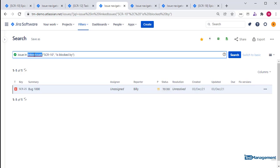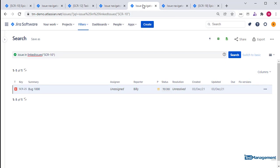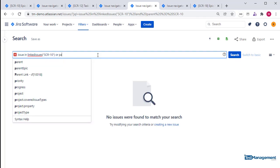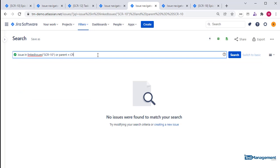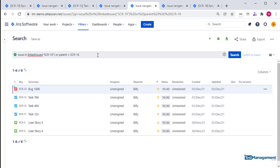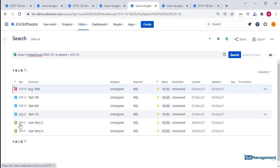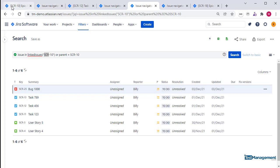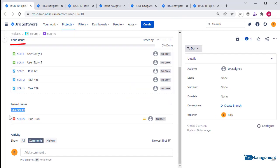If you want to find all related issues, that is both child issues and linked issues, then you can combine both of these JQL statements with 'linked issues OR parent equals SCR-10'. And that will get you both the linked issues and all of the child issues for that one parent or epic that has both linked issues and child issues.